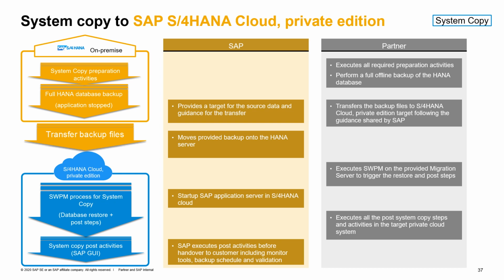Once this is finished, SAP Cloud Operations team will have to execute their usual post activities before handing over to the customer. And these post activities include setting up monitoring tools, backup, scheduling standard jobs, validation of add-ons, and the content of the system.